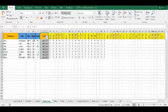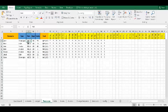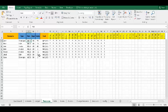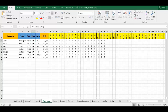For example, if we look at John, you've had him for 90 days, but you allocated the task for only 50 days. If we just go back and filter John, it's pretty clear that it's only 56 days. So this is where you should probably go and look at his allocation, and this is what the resource feed is meant to do. It's meant to give you an idea of where you're not using your resources adequately. And this is where the whole resource health is also drawn from. So that gives you an idea.